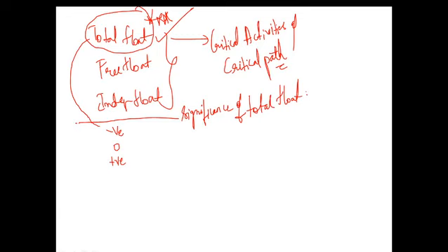The value of total float will be negative when the time availability is less than activity duration, and the value of total float is 0 when time available is equal to activity duration.